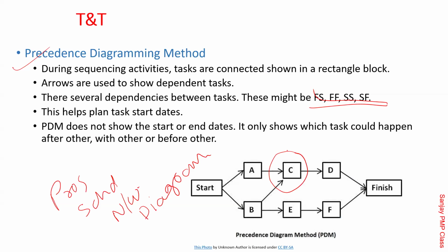Now, Pawan, did you notice that this activity C has multiple arrows coming into it? Yes. These types of activities are called path convergence. Are you getting this concept? Which means there are multiple paths coming into this. It's basically not a road, it's a junction where multiple roads are coming. On the other hand, if you look at B, this is called path divergence, from which more than one arrow originates. Is that making sense, friends? Yes. Maria, the arrows that are coming in are called convergence, and if the path is diverted, then it is called divergence. Correct, exactly.